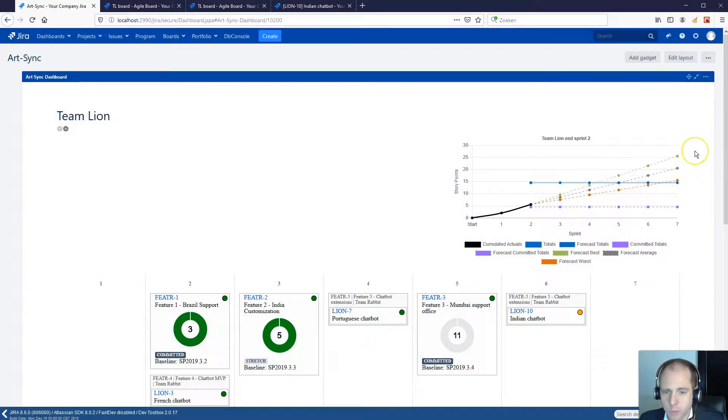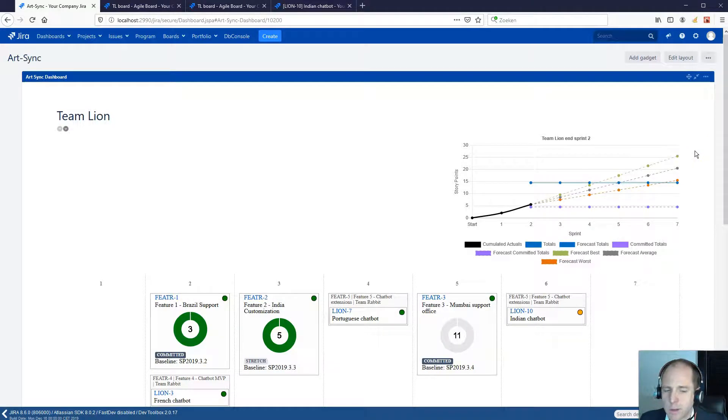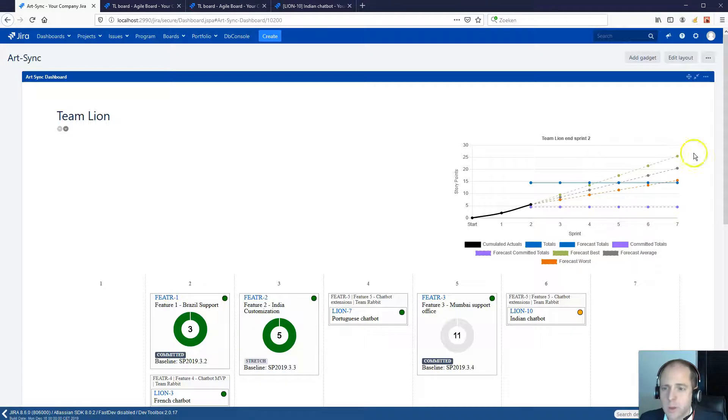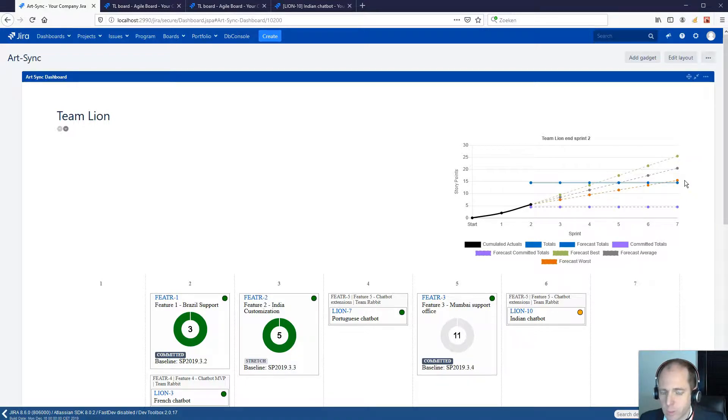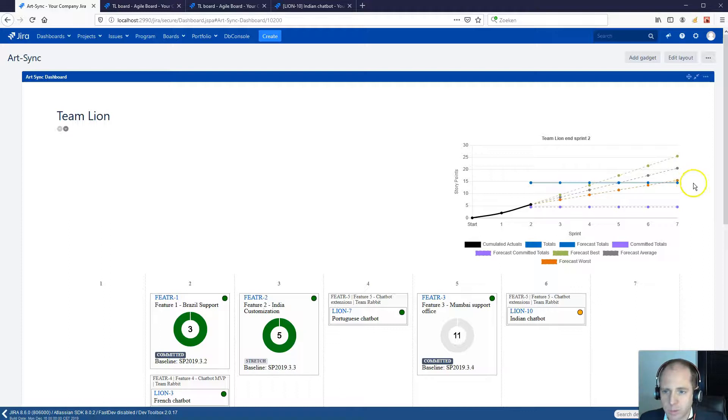There are three extrapolation lines. The green dotted line is an extrapolation according to the fastest sprint velocity, the grey according to the average sprint velocity and the orange according to the slowest sprint velocity. The intersection with the blue line gives the optimistic, realistic and the pessimistic prediction.